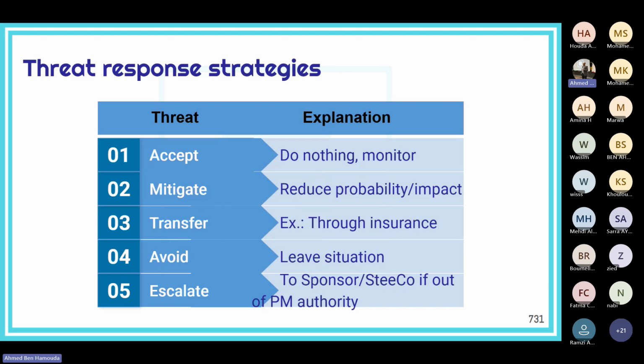then we might decide to build a huge and large garage to store the machines. Of course, the garage can be done in 1 day, for example, if we use prefabricated materials. However, it will cost us around 30,000. Now, again, we go back to the usual question: is it worth spending those 30,000, even though the weather forecast says there is an 80% probability that it would reach our location?